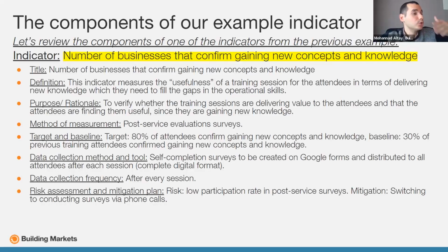We want them to fill out a survey, we want them to take the test, which is for our sake. It is important for us, we want to understand. So they might be less interested. They might say, okay, we are done, we received the service, thank you, but I don't have time to take a survey with you. This is a common kind of issue. It is a risk, of course, and here we have to think of some solutions or mitigation plans.